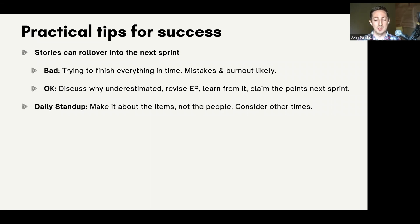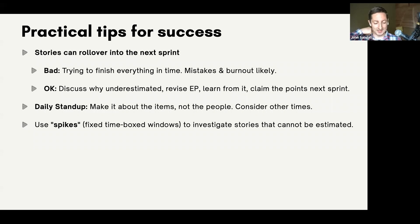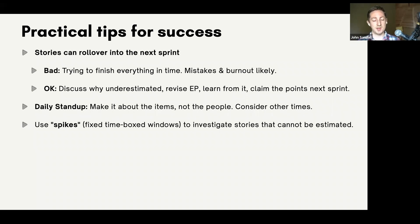Daily stand-up: make it about the items, not the people. Lots of people do stand-ups first thing in the morning — consider other times. Have a conversation with your team: is 9am really the best time? Maybe they just want to come in and crack on with what they were halfway through yesterday. We do a mid-day stand-up, which we learned from another London startup, and it works really well for us. Use spikes: if you're not sure how long something will take, don't spend forever estimating it. Use a fixed time-box window — a three-hour spike where one person researches it. That's enough time to know how long the full task will take, so you can break it down into the right stories. Never skip the retro — it's too valuable. It's your optimization process, and your teams will not forgive you if you skip it repeatedly. This is an investment in your team's future productivity.